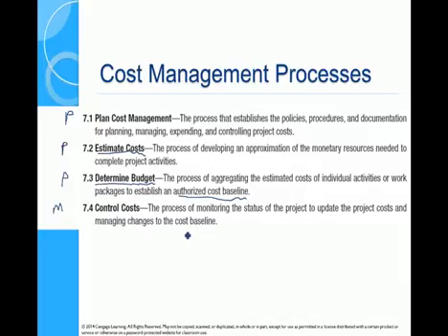Those cost controls look at our performance against our cost baseline, but our cost baseline is on what is the money spent, so what part of scope, and when is that money spent, so when in the schedule. And bringing those three, schedule, scope and cost together for monitoring is this term earned value management, EVM. So earned value management takes the notion that every time you complete a part of work, you're earning value for the project sponsor. So managing that value is the way that we can look at cost controls. We'll deal with that in lecture 6C.